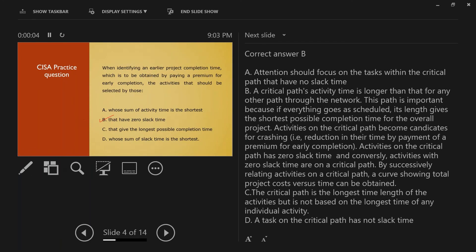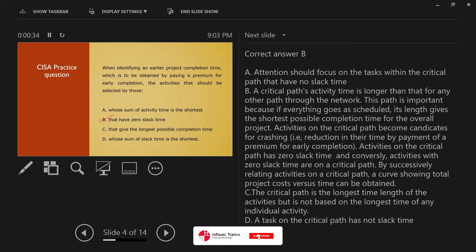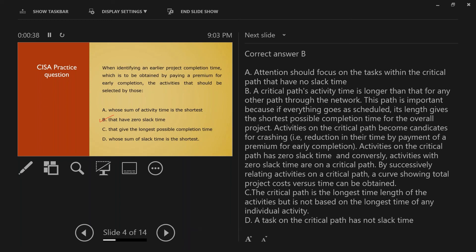Attention should be on tasks within the critical path that have zero slack time. The critical path activity is longer than any other path through the network. The path is important because, if everything goes as per schedule, its length gives the shortest possible overall project completion time. Activities on the critical path become candidates for 'crashing' — reduction in time by payment of a premium for early completion. Activities on the critical path have zero slack time, and conversely, activities with zero slack time are part of the critical path.